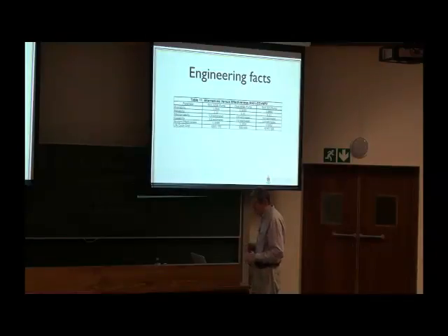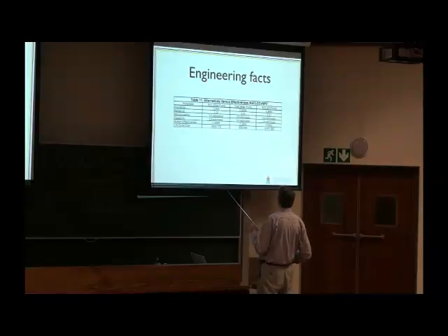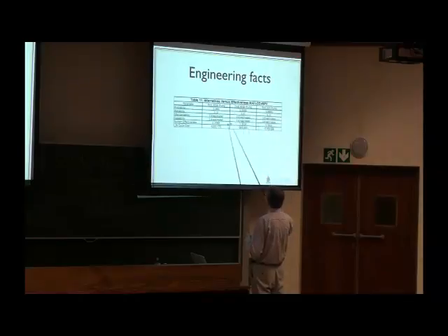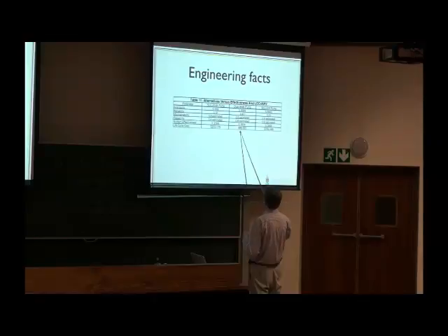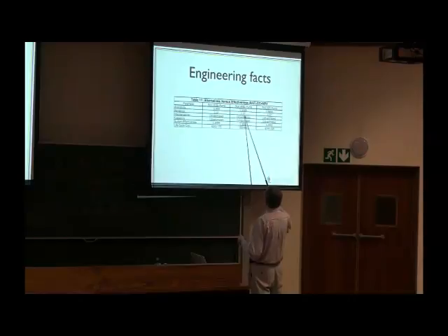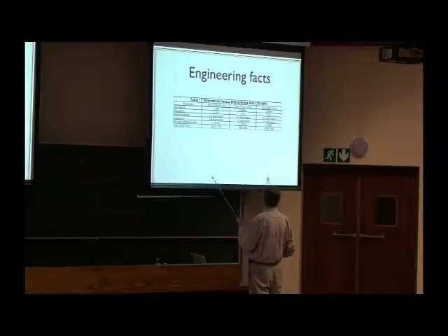So there we have a table with all the alternatives and the figures compared and so on. So you see that the dual ANSI pump has much higher effectiveness than either of those two, and a much lower life cycle cost. So it just makes sense. And it's because of the higher reliability. That's where you really win. You win there as well in availability, but the reliability is really the one where you score. And that's the reason behind.